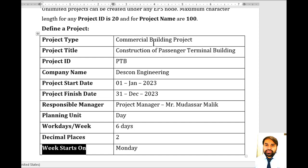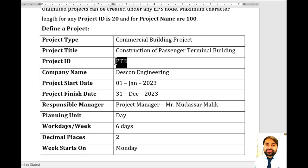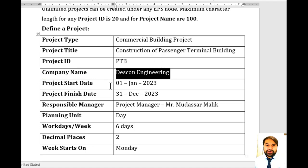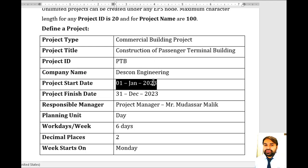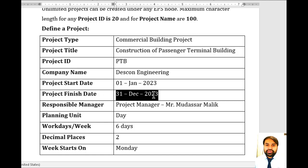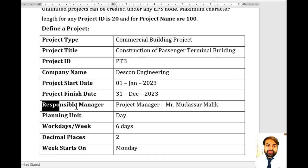I have arranged a sample: the project type is commercial building, the project title is 'Construction of Passenger Terminal Building,' and the project ID is PTB — standing for Passenger Terminal Building. The company name is Descon Engineering, project start date is 1st June 2023, and project finish date is 31st December 2023 — so this is a one-year project.